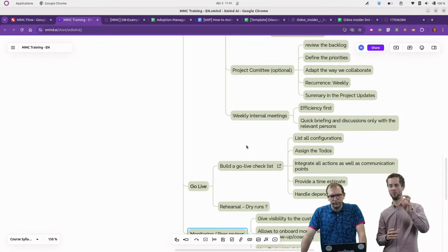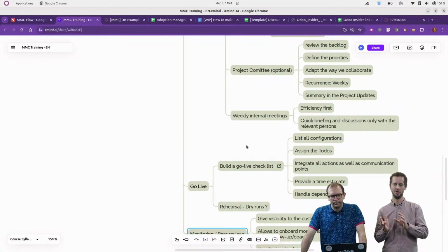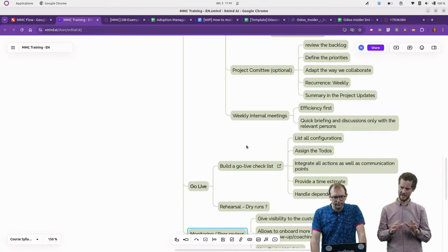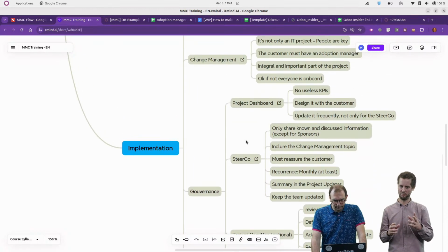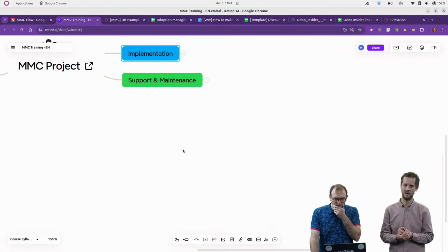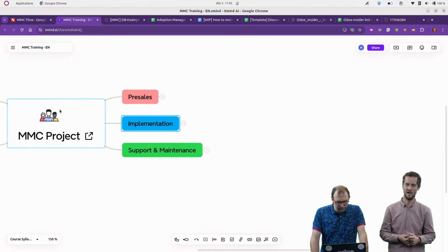So that's something we faced a couple of months ago, where we realized that the end users shifted to the other software without telling anyone. We detected that simply by luck when the PM on the client side went on the manufacturing floor and realized that they had left Odoo and opened their Excel file again.